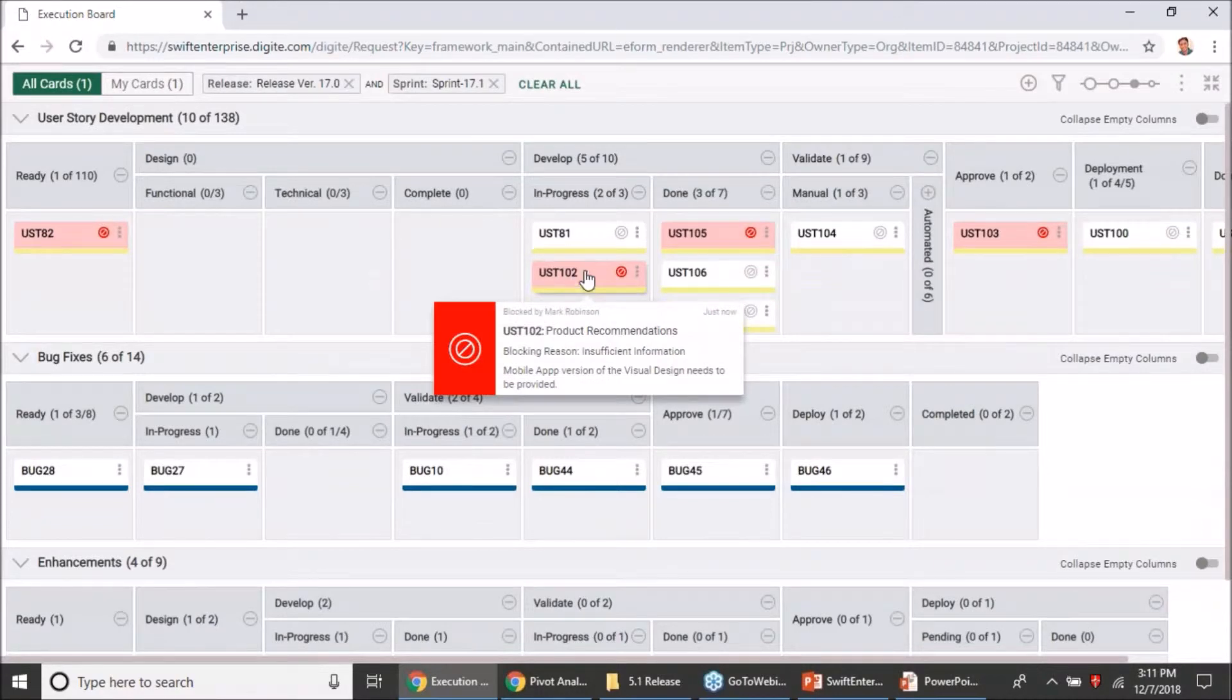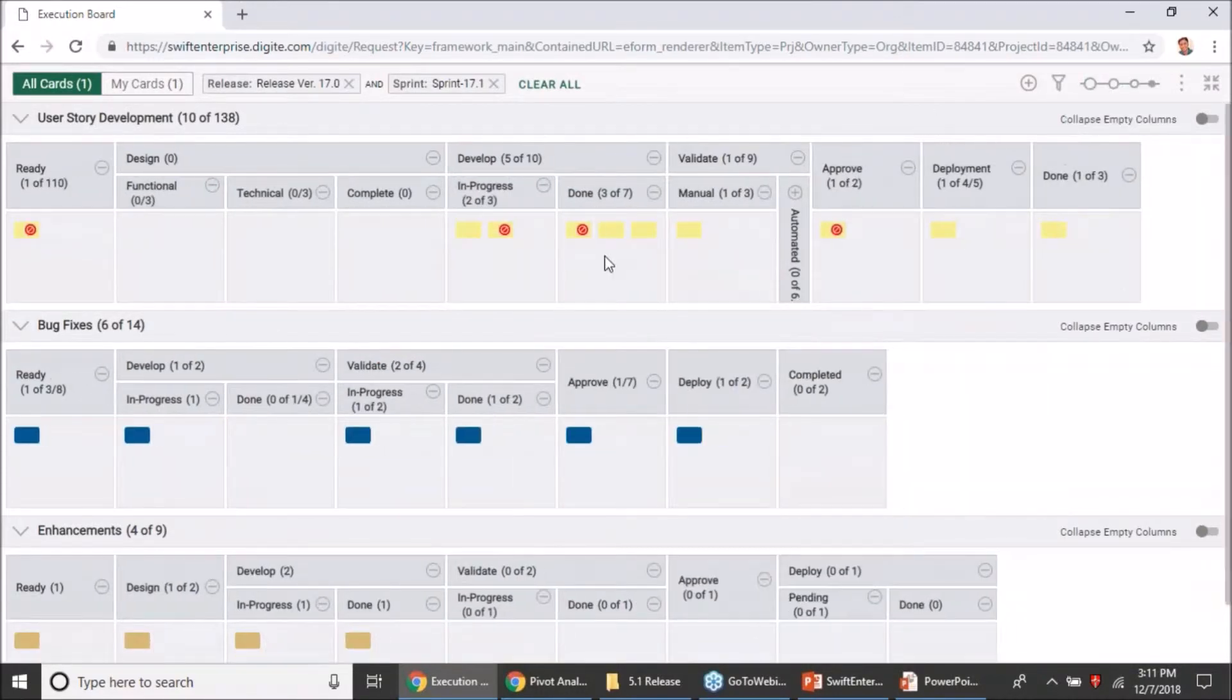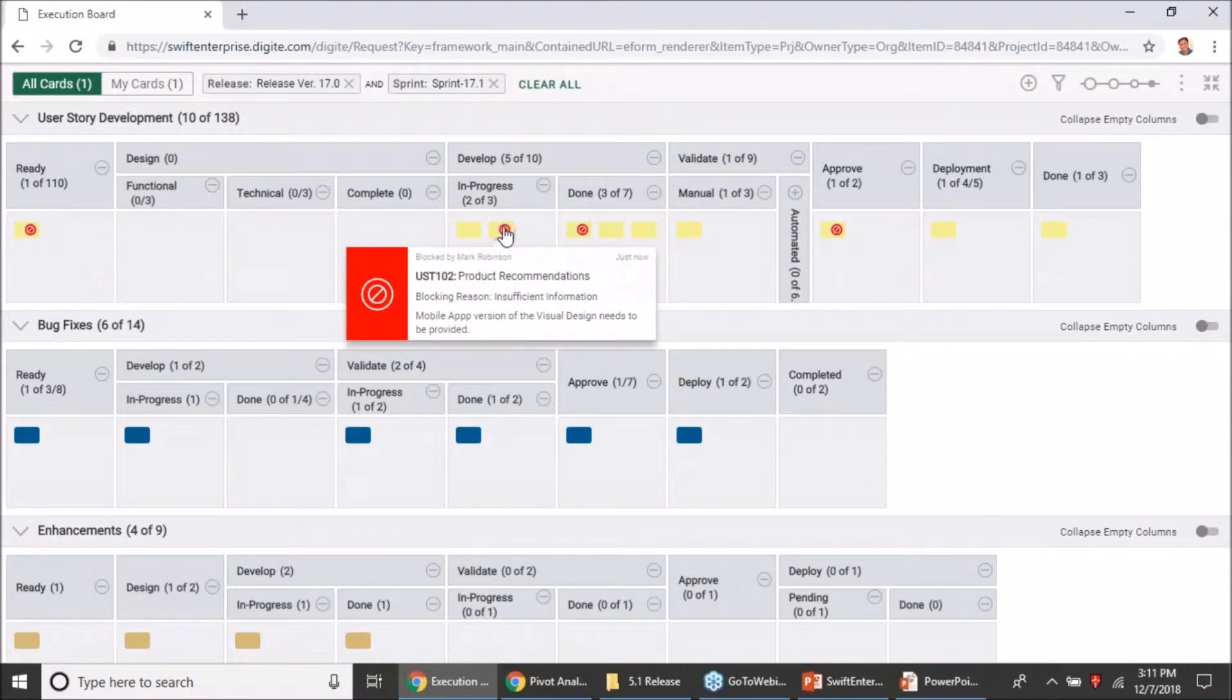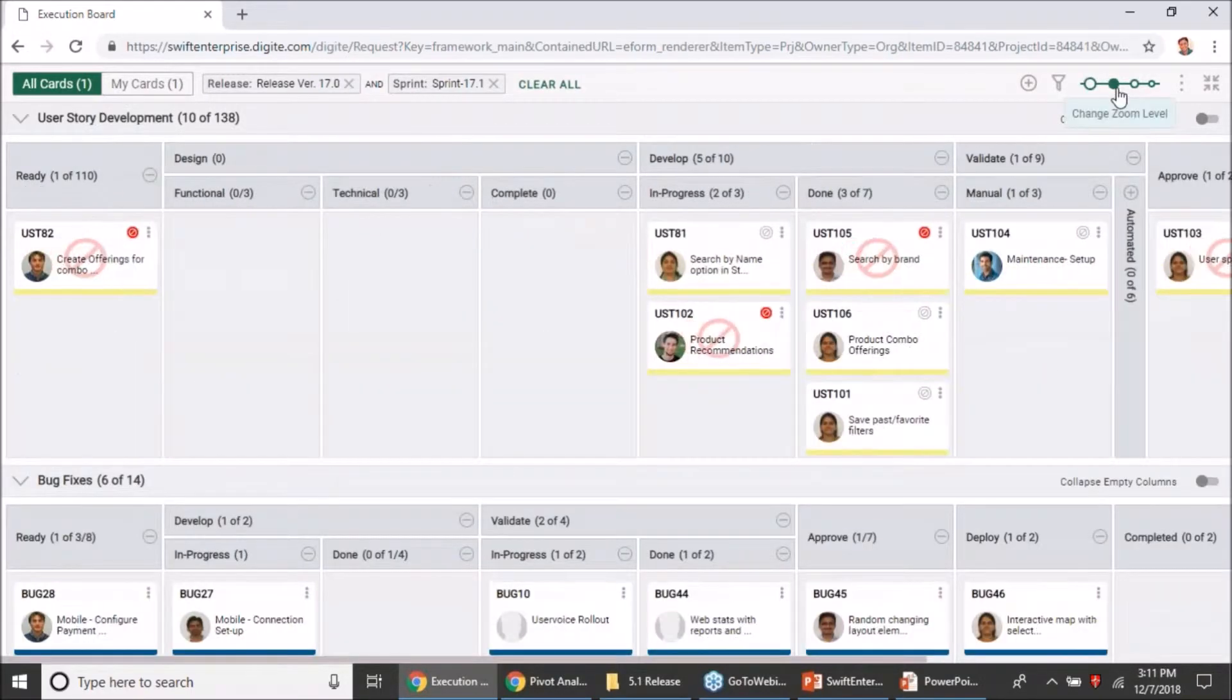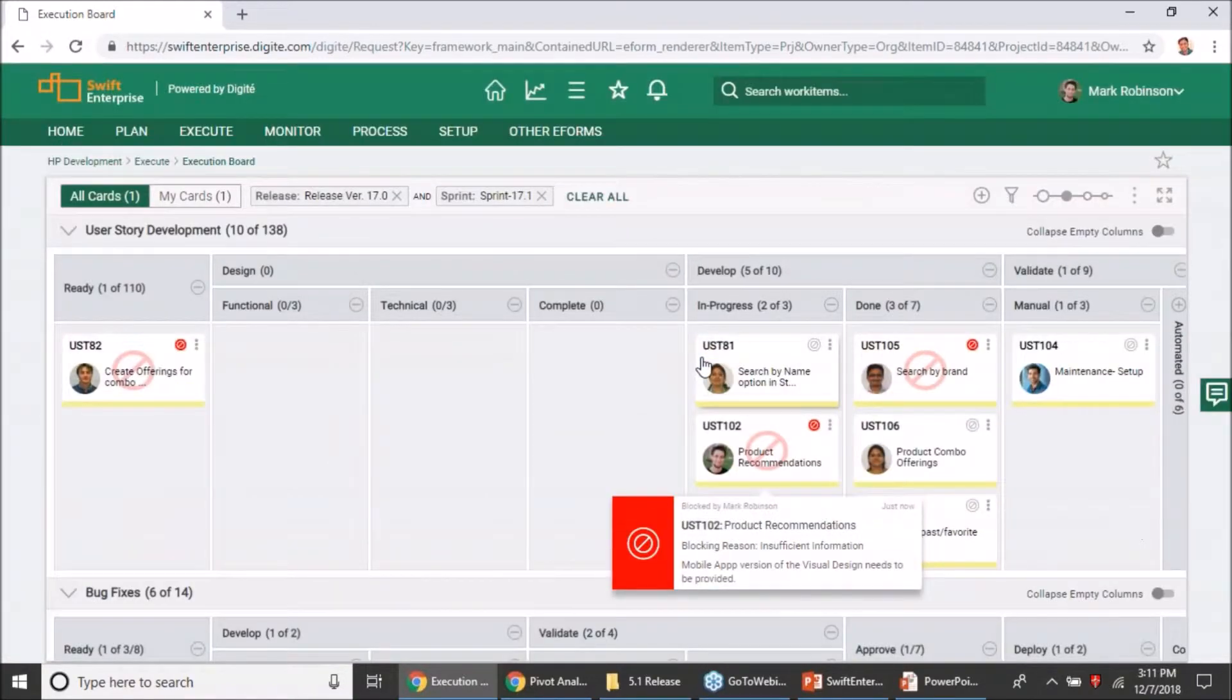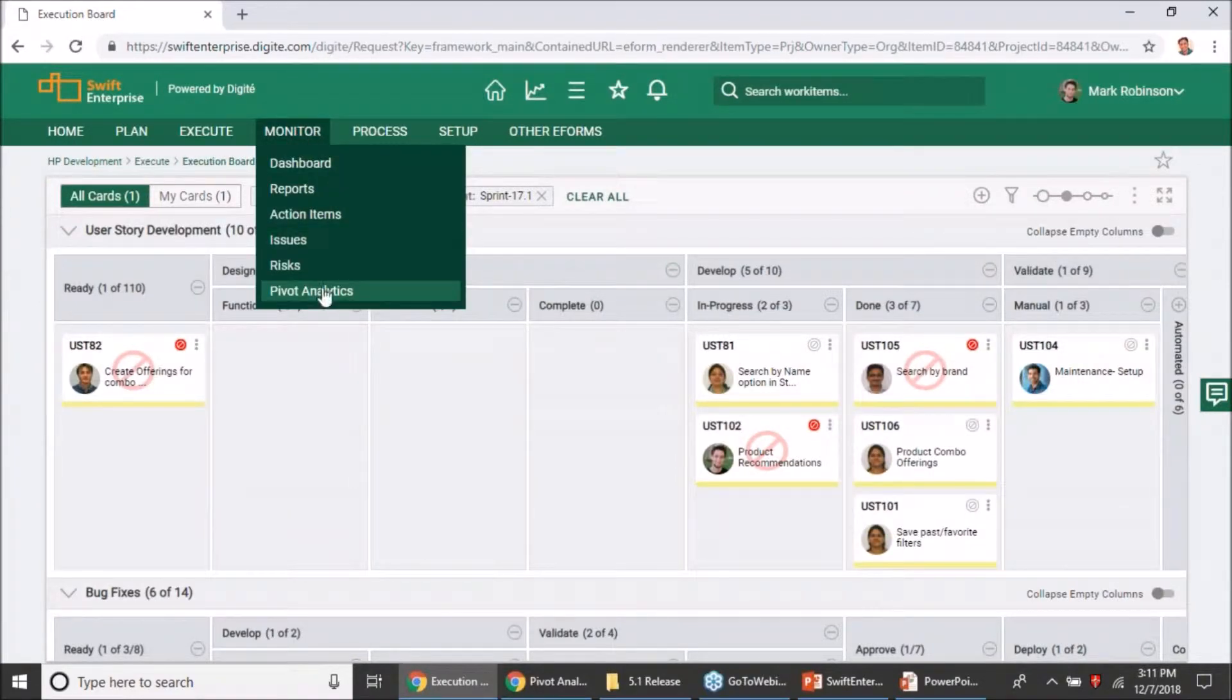No matter what zoom level you are on, you will always find that information handy whenever you are doing a hover over such cards. Once I have blocked the card, it also helps me go back and analyze which are the blocking reasons which have contributed to the blockers most of the time.